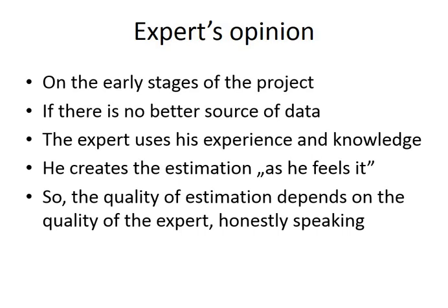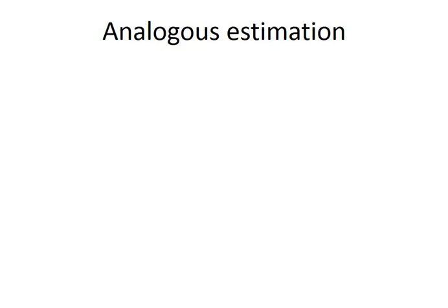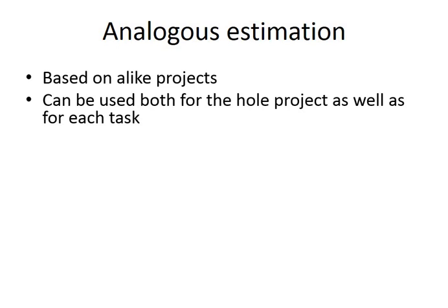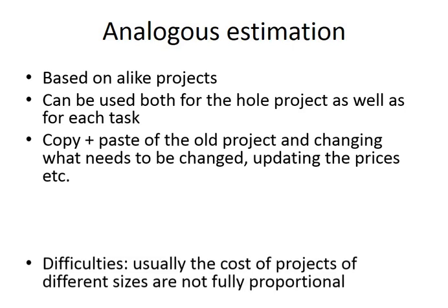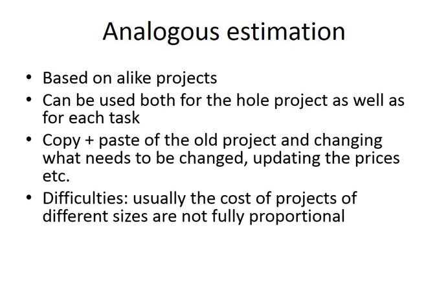And then there is analogous estimation, which is based basically on previous projects. So if you're executing project after project and they are more or less alike, then you have enough experience to prepare a good cost estimation.